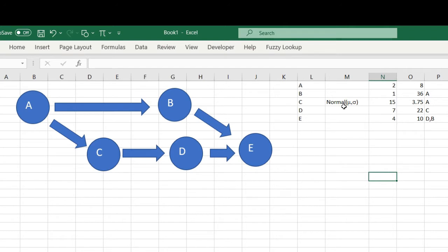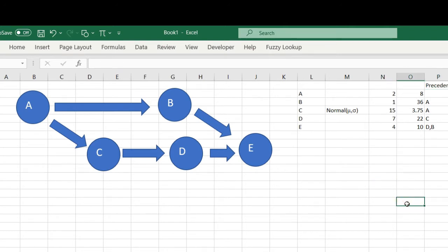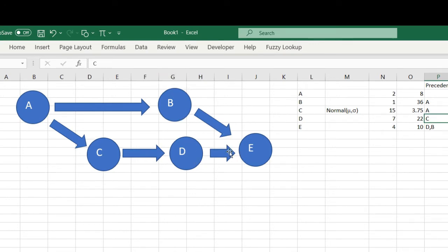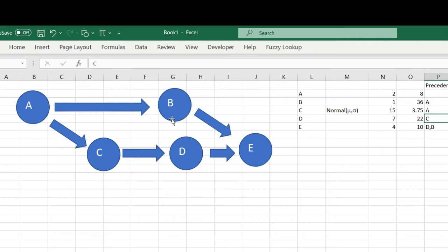B is after A, and C is after A also. D is after C, and E is after B and D. If you know a little bit about project management, you usually take the one which takes the longest time. So if we arrive at this point with a time of 26 days and this is 38, we cannot do E after finishing 26 days—we have to wait for 38 days.